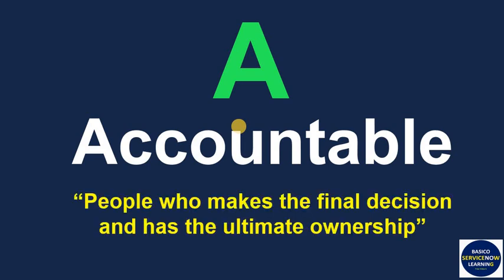The letter A stands for Accountable. We give A to those people who make the final decision and have ultimate ownership. For example, the test lead takes ultimate ownership of test case creation and makes the final decision about what test cases need to be created and what requirements need to be covered.